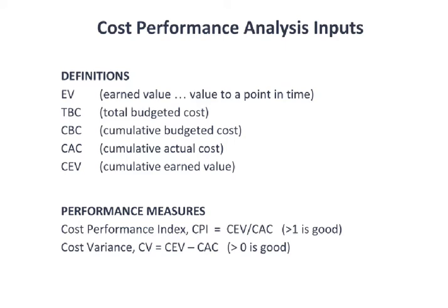Okay. Cumulative earned value grows with time. So if on Monday I go and ask them, okay, how much have you done? They say, we've earned 20% of the value. I go back on Tuesday, they say, well, now 30%. I go back on Wednesday, they say, well, now 38%. The cumulative EV turns into a plot.